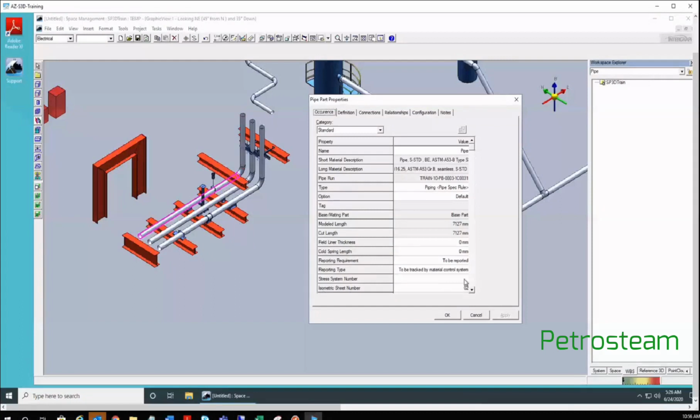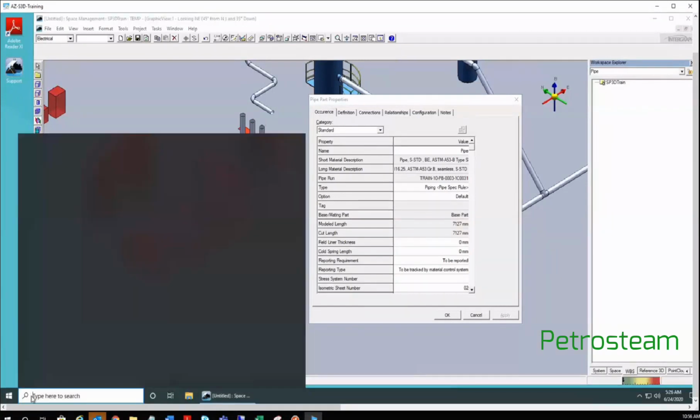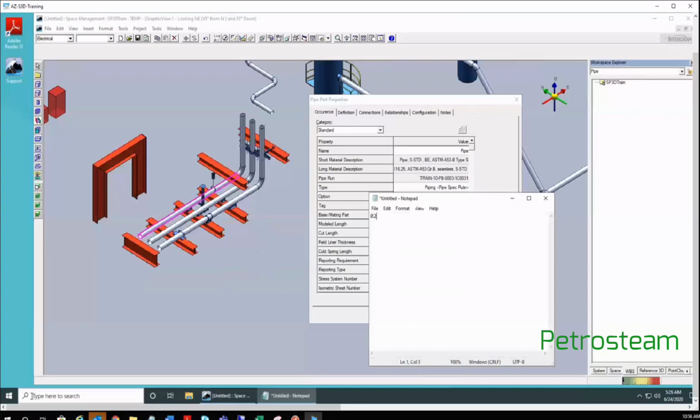Then the backend rule checker will process, and if it is within a split WBS, say split WBS in the project like Dukum and all, split WBS names are 02001 and 02002. Like this split WBS names are there. Then for this pipeline, if it is modeled within the 02001 volume we have created for WBS, then automatically it will assign that volume name first.